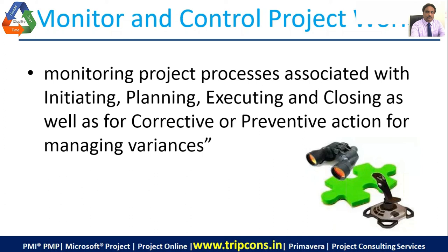So you are already aware of it. You know that is an excellent project management tool. When you have planned it, I believe you must have created a baseline of the project plan, and then you would be putting in the actual values of the tasks as they are being performed by the various team members, and you would get an analysis done by the software. You just have to take the decisions: where you have to speed up which task, where you have to apply more resources, where you have to look into some sort of troubleshooting. So that would be monitor and control project work.